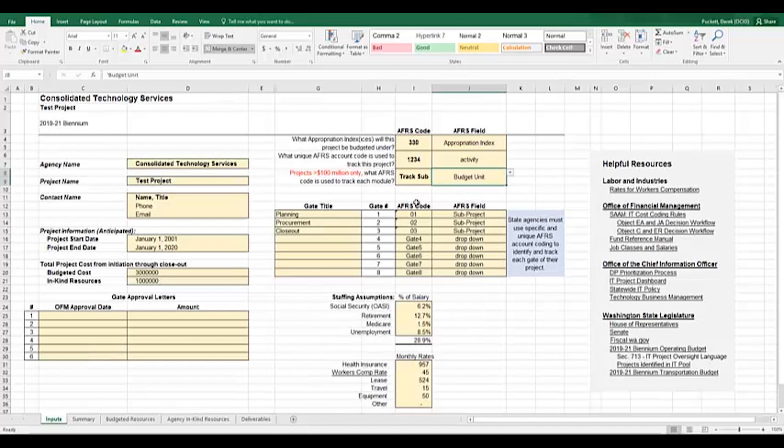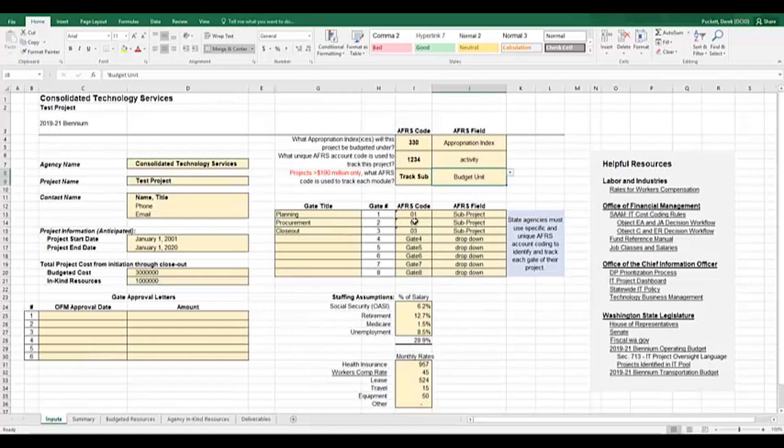The next section, beginning in cell G13, is where projects need to identify their gate codes. Be sure to write the titles of your gate in these rows, as well as the APERS code and field your agency will use to track the project's budget and actuals. My project has three gates: Planning, Procurement, and Closeout. I've indicated the APERS code that I will use to track these gates in cell I13, I14, and I15. I've also indicated the APERS field that those codes will be charged to in cell J13, J14, and J15.